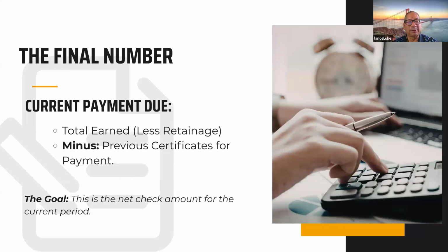So the $100,000 being billed for, if we say that the project had a contract of 10% retention, which means that every month 10% of the total amount that's invoiced is going to be held back in the reserve kitty. So in the example of the contractor submitting $100,000, he doesn't get paid $100,000.